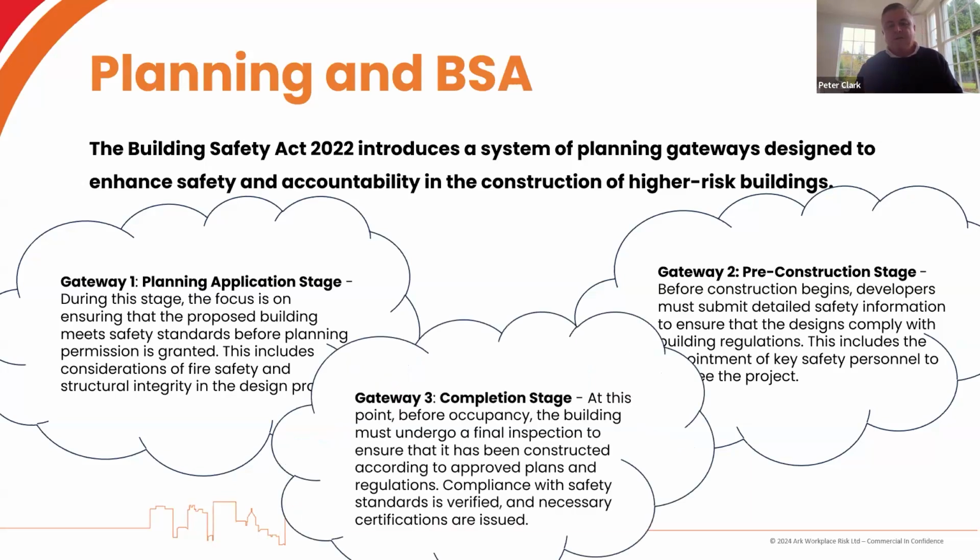So then the final gateway is the completion stage. Now, this is the one that at ARC we get involved with an awful lot. We have clients that are at gateway 3. They've got a building that is at practical completion. At practical completion, they hand over a series of documents to their managing agent. The managing agent now has a legal duty to accept those documents and write back to the owner of the building and say, I've got them, they all make sense, they all work, and I'm happy with them. That places a lot of accountability on someone who's maybe not used to that type of thing.